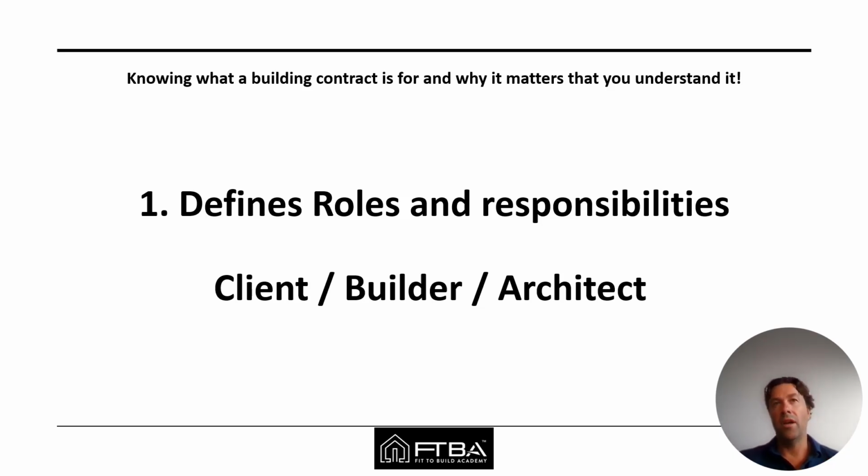In its simplest form, there is the client responsible for the entire project, typically including the procurement of the design, the consultants, procurement of the building team, and secondly, a contractor builder that has been tasked with the responsibility of building in accordance with the documents that the client has provided. The builder has legal responsibilities to build to the relevant building codes and standards applicable to the project as well. So they are all baked into a contract, or should be baked into a contract.